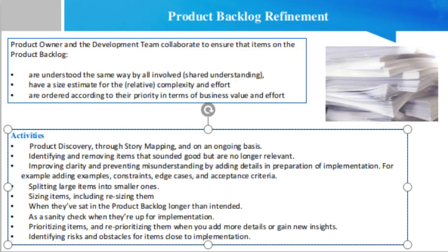Emergent: you can reflect the insights easily by adding, changing and removing items. Estimated: every item is roughly estimated or sized, and resized for new information as an item gets closer to implementation. Prioritized: keeping the backlog deep ensures that items with the highest priority, the ones at the top of the product backlog, have a refinement level that's ready for implementation.